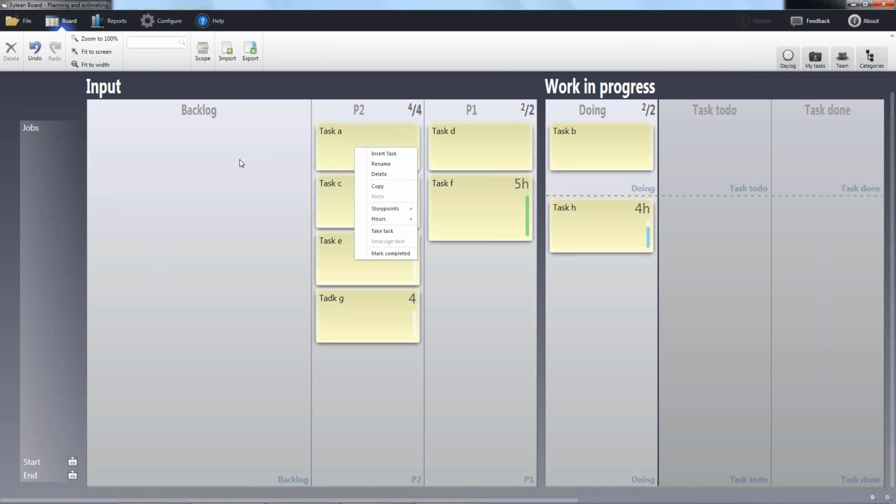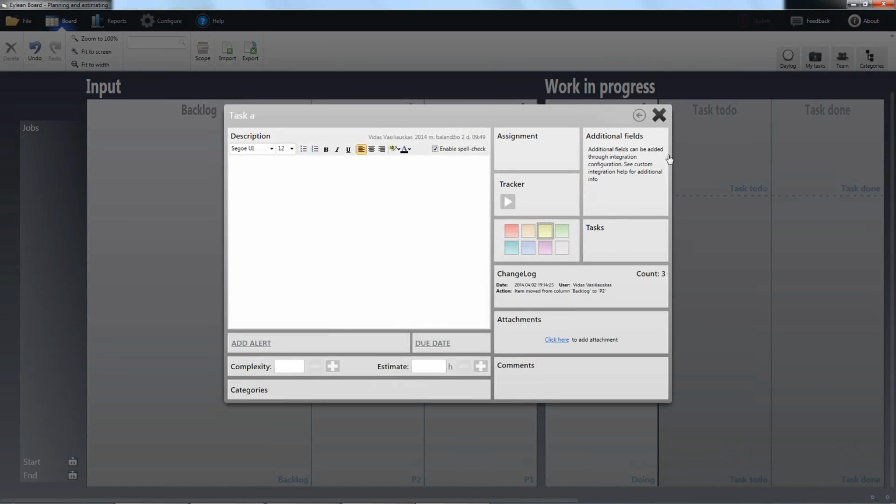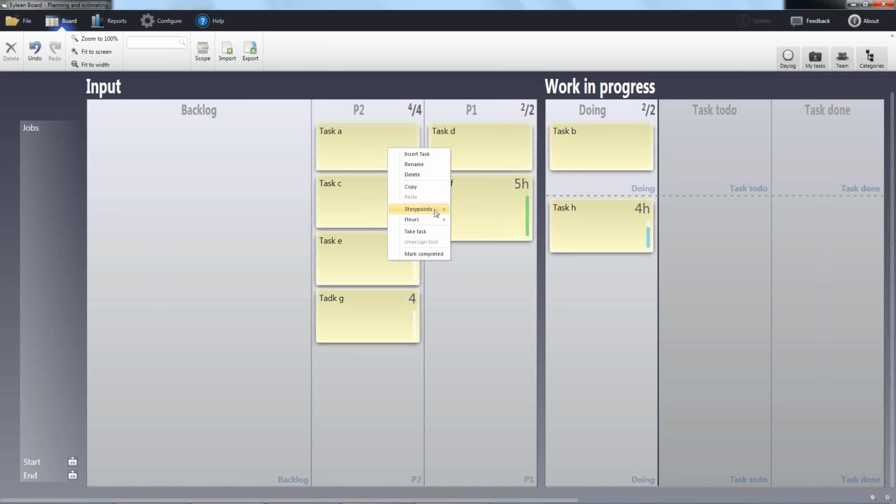And of course, like in Agile, you are free to measure in any points you like, but basically story points should be measured in Fibonacci sequence. Fibonacci sequence is a sequence of values where the next member is calculated by summing up the previous two. So, previous like 0, 1, 2, then 3, then 5, then 8, then 13, and 21.